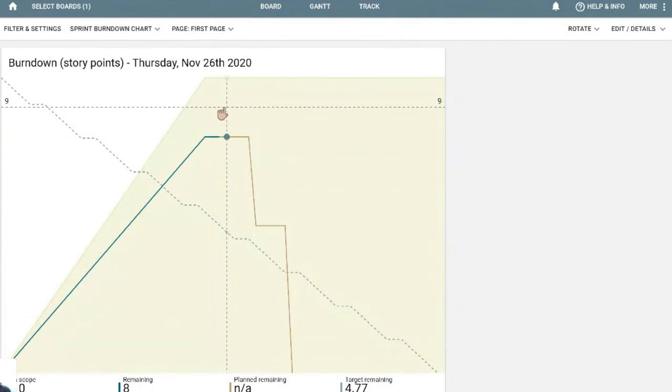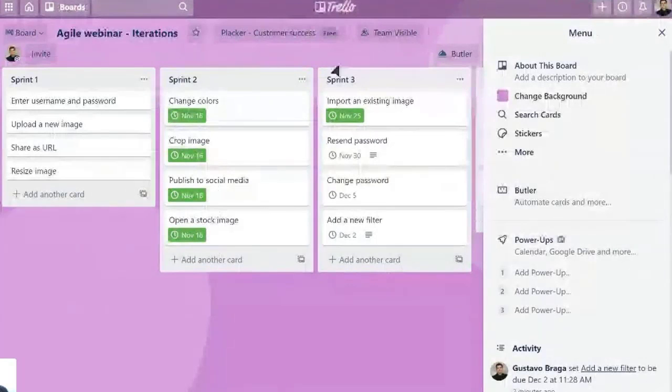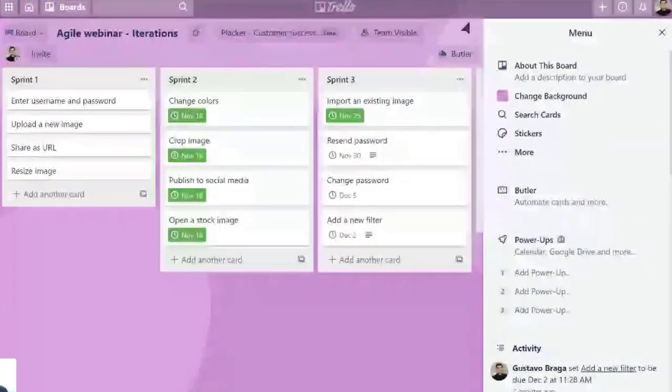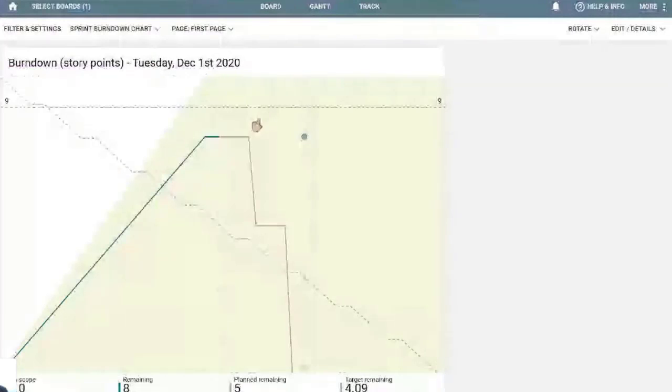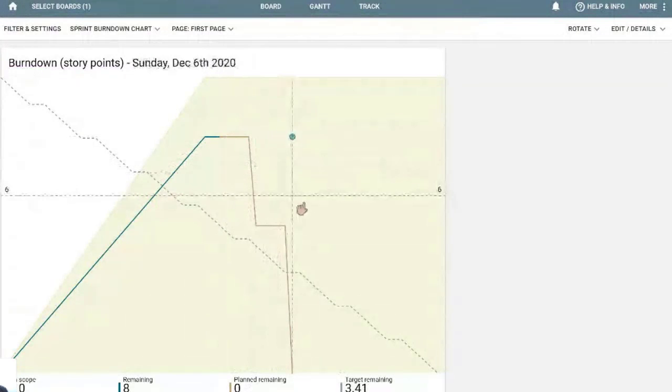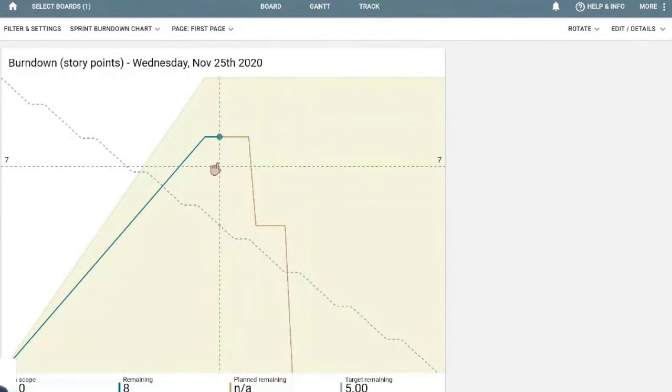But one of these options is exactly the burndown chart, where you can see the amount of story points. Remember that we were talking about the story points. So for example, in Sprint 3, we have 10 story points that we're going to work on.